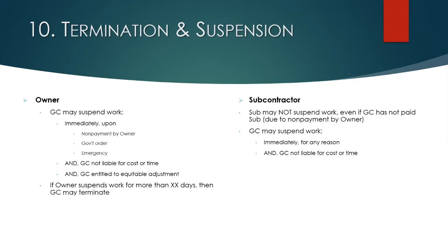This slide addresses suspension, which is slightly different than termination. With the owner, you do want to explicitly address your rights to suspend work, and you want to be able to suspend work immediately upon non-payment by the owner. If the owner's failed to pay you on time, you want to be able to stop, walk off the job until the owner pays you, and then you'll come back.